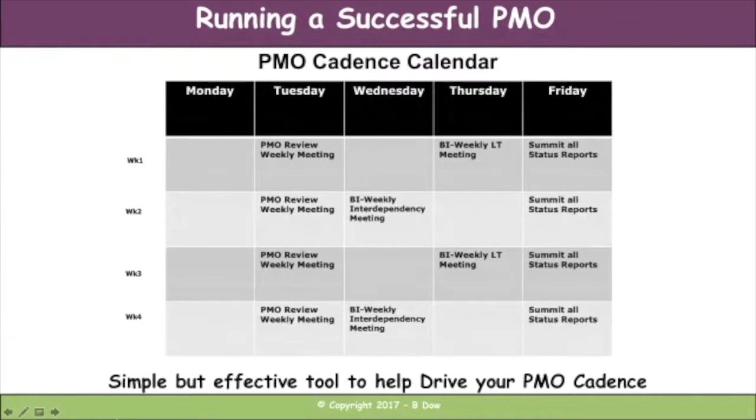And so you've got the 5 days of the week, you've got review meetings, you've got interdependency meetings, you've got LT meetings, you've got things such as, hey, you all have to submit a status report on Fridays, right? Very simple, but it really helps you drive the cadence of your PMO. And so I think it's very, very important to really drive through and make sure you have this set up and make sure everyone is abiding by this.